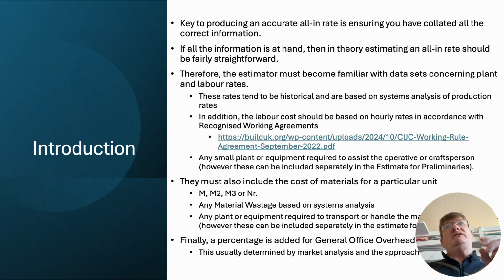That's based on what the RICS, the trade unions involved, and the CITB have got together and worked out: this is how much we should be paying an operative, and we might charge extra. Do you know what I mean? The working rule agreement might say that an operative should be paid £20.37 an hour or whatever it is, but actually we are charging the client maybe £30 an hour.